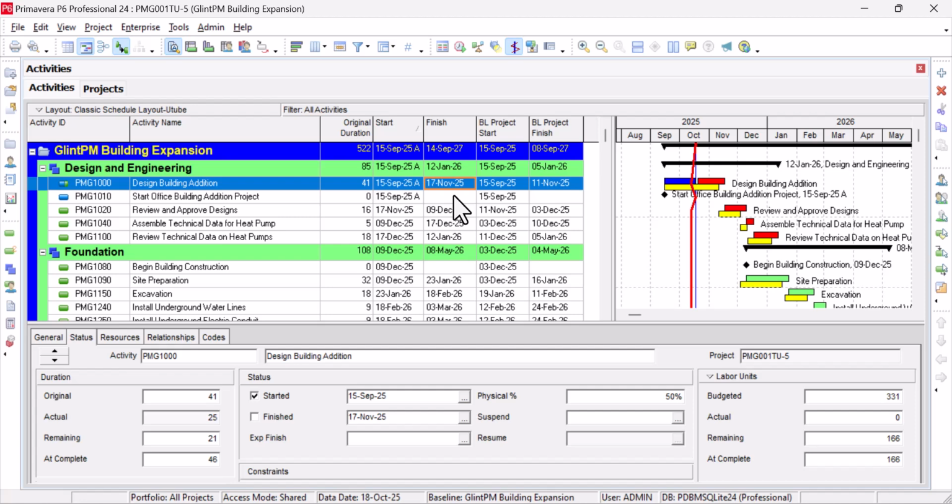At the end of the day, we will not meet our project completion date of September 8, 2027. Already, it's taking us to September 14, 2027. That is 6 days delay, which is coming from just this activity. So imagine you have this delay, you have further delay, and the activity is critical. You need to do something about it.